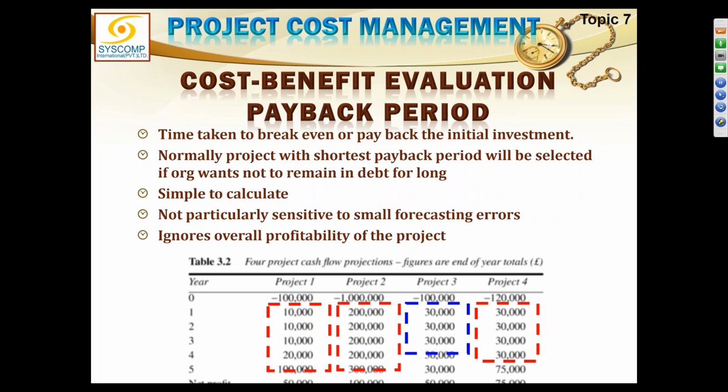Project 3, we invested 1 lakh rupees. We recovered 90,000 in 3 years, and just in the beginning of the fourth year we will be able to recover the whole amount. Look at project 3. It takes exactly 4 years to recover all the money.